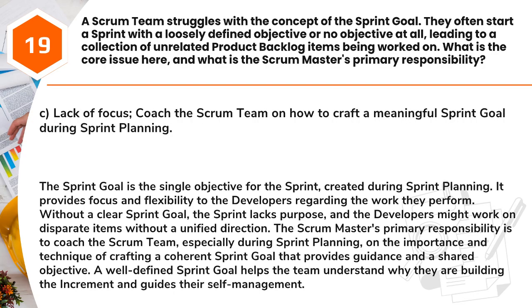Answer: C. Lack of focus. Coach the Scrum team on how to craft a meaningful sprint goal during sprint planning. The sprint goal is the single objective for the sprint, created during sprint planning. It provides focus and flexibility to the developers regarding the work they perform.